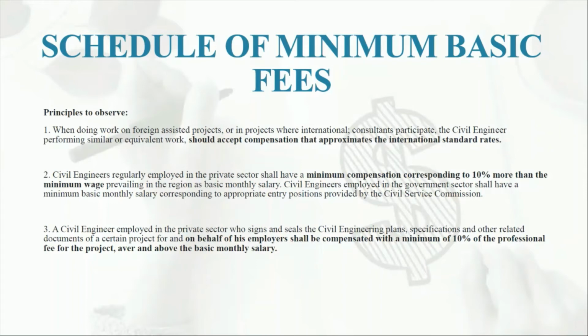So it means if it's an international project or a collaboration with an international firm or company, the engineer, whether they are from the local country or the country itself where the foreigners will be making the project, must accept the compensation that is in reference to the international standard rates, which means the Philippine standards will not be the base or the reference of the compensation of the civil engineer.